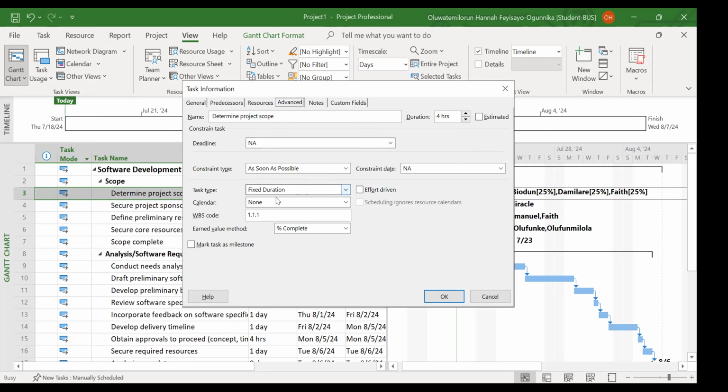Because that task was said to be fixed unit, by the time we reduce that to 25%, it's telling us that you need the full-time people on it. If not, then we need to extend that activity. Does that make any sense to anybody?